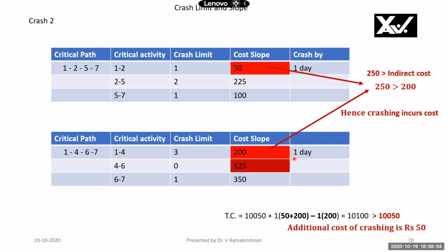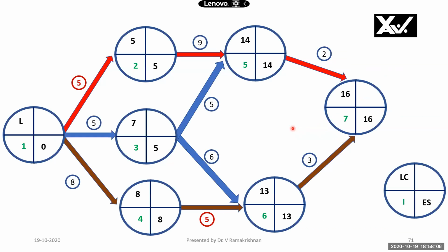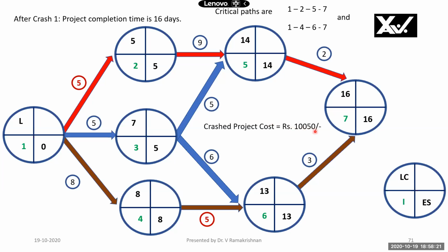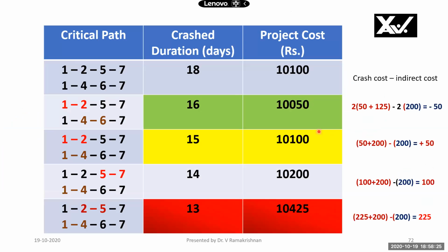We will have to check with the management whether it is acceptable or not. But please note that we started with 10,100 for 18 days. Now we are ending up with the same cost. Therefore, we are able to crash the project duration without incurring any additional cost. So this is what we are recommending. But what management may say is, we don't mind 15 days at 10,100 rupees. So we are not incurring any additional cost, but we are saving.